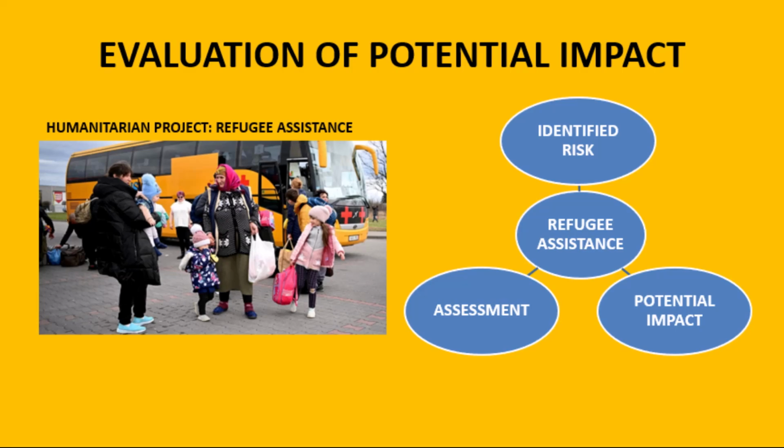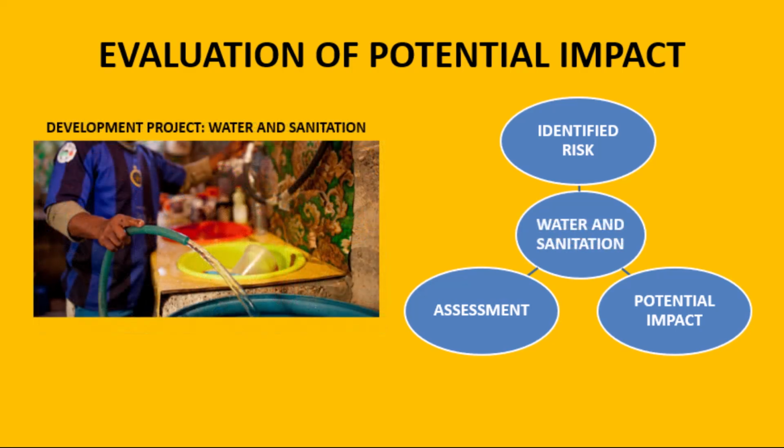Potential impact here is limited access to education, which would hinder the long-term integration of refugees into the host community. Our assessment then is to seek additional funding sources, collaborate with educational institutions, or prioritize the most essential components of the education program.